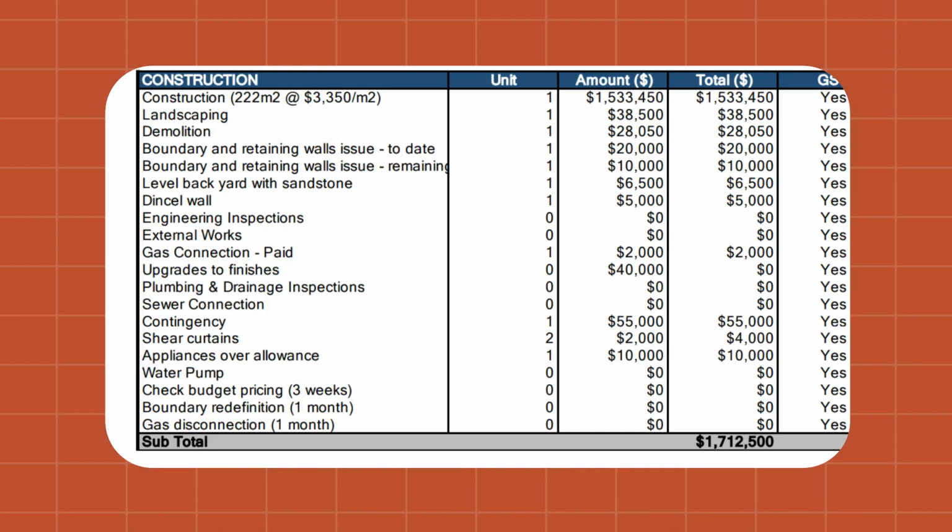With this project, we shortlisted 4 builders and ended up tendering to 3 before the approved builder was chosen. Now on this site, our building costs plus contingency is sitting at about $1.7 million. So we were within about $12,000 of that on this site at the end, which is pretty good.